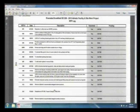Although we did have a visitor come and talk about the $214,000 cap that we used to fix the stone base, remember that was identified as one of the significant causes of why we were retaining water instead of draining water. Plus, we got a credit for $85,000. We also achieved an $87,000 credit for stone from the previous installer. So for the magnitude of this project, we're hovering right around $200,000 in change orders, maybe slightly under that. For a $9 million project, we're really watching it tight.